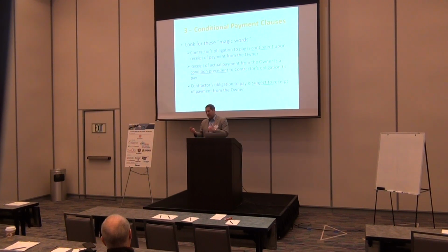In a lot of contracts you're entitled to see the contract with the owner, so you could ask for that at the time of the contract. Usually it says you have a right to see that, because it usually incorporates provisions of the private contract. So you ought to ask for that. But particularly if they have that language, one way to approach it is to say to the general contractor, I think this might be what I heard in the seminar called pay if paid. Can we just rewrite it for this? And if they say no, we can't do that, say, well, then I need to see who your owner is and do a credit check. Sometimes they'll say, sure, I'll modify that for you. This has happened.